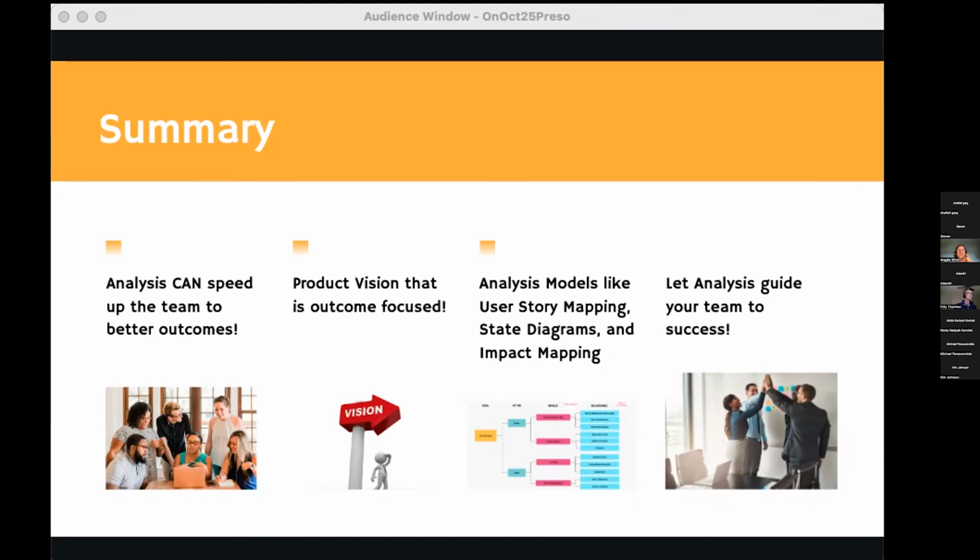So I'm gonna dodge that bullet for you and challenge you guys to write real user stories for those items. So a defect comes in, the defect needs to be analyzed for the real user story that's underlying there, versus just every defect getting a story or every technical task getting a story. So just gonna throw that back at you.